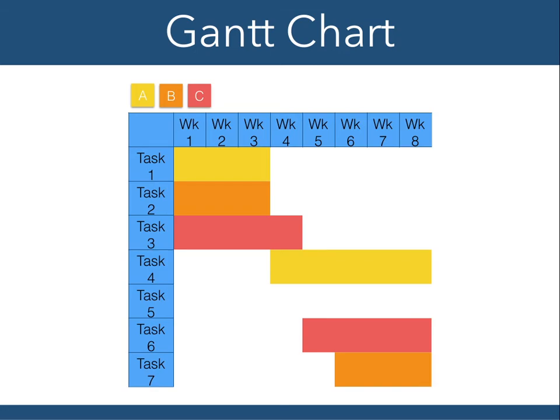Which means in turn you have to work out what the parts of the problem you're trying to work on are, and how they fit together, and in what order they fit together, and how you can allow many people to work on the bits independently. If you don't have many people, then you have a bit more freedom, but on the other hand, you still realistically want to know what you're going to do in what order. And quite often there really is just a logical order which you can go through that makes sense and allows you to test bits of the code as you go and make sure they all work together nicely.